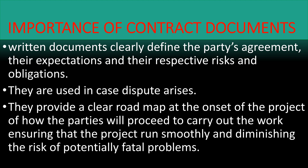Number two: these contract documents are very useful in case a dispute arises. For example, if there is a dispute in terms of price, they should consult the bill of quantities. If there are disputes in terms of the design, they should go to the drawings. And disputes about the roles of the people in the project should be resolved by consulting the conditions of contract.